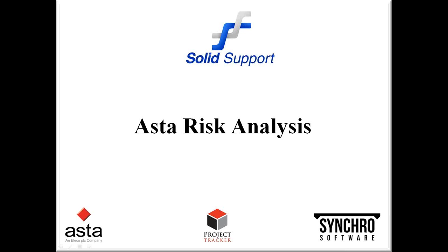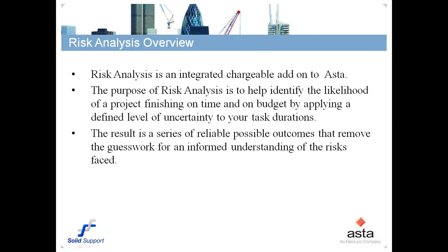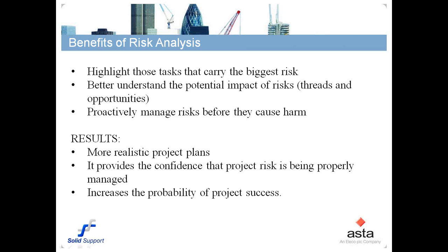Today I'm going to present Asta risk analysis. The purpose of risk analysis is to help identify the likelihood of a project finishing on time and on budget. We do it by applying a defined level of uncertainty to tasks' durations. As a benefit, we can highlight those tasks that carry the biggest risk. We can proactively manage risks before they cause real issues, and as a result, we've got more realistic project plans and increased probability of project success.